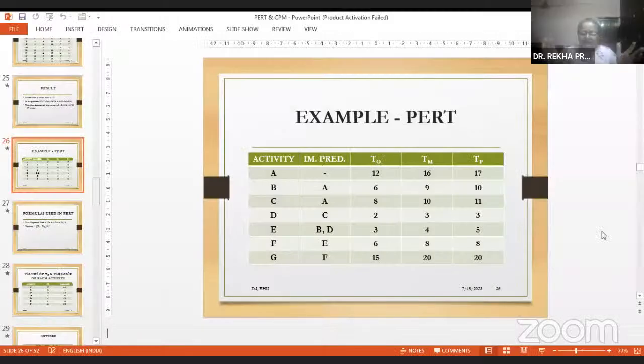First of all, you decide on the land, that will be the initial activity. Once you have decided, you'll have to get all the permissions from the municipalities. Once you have got everything, or you can do it parallelly also, get hold of an architect who will design the building. Then the architect will bring in all the manpower to make the building.